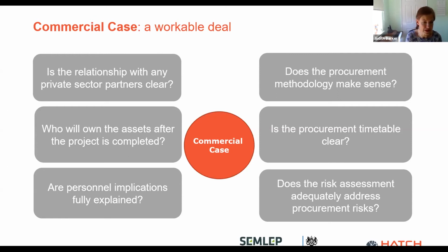and all of that just needs to be considered. I think at the moment, one of the key things in terms of procurement for current funding opportunities is that question about the timetable. What time have you set aside to do a procurement? And what is the market situation? Certainly in our experience on Local Growth Fund at the moment, there's a lot of variation on lead times for capital items. Some things it's very easy to get hold of. Other things, whether it be plaster, windows or doors, can be particularly challenging to get hold of at the moment.